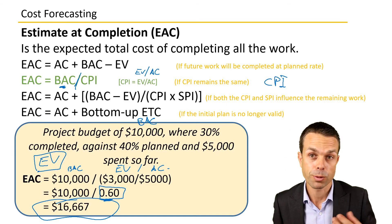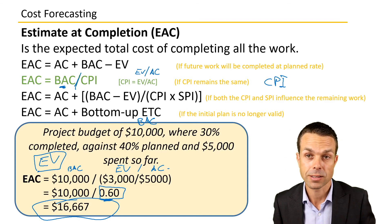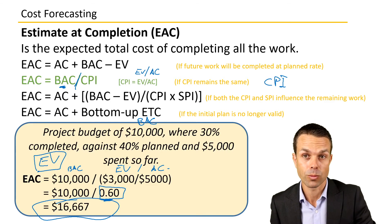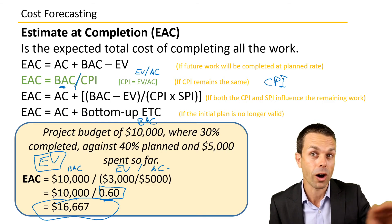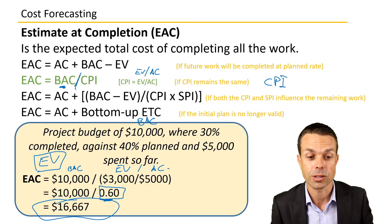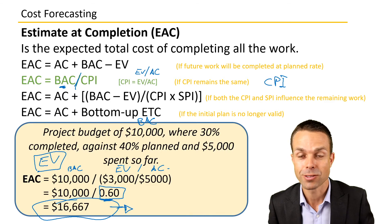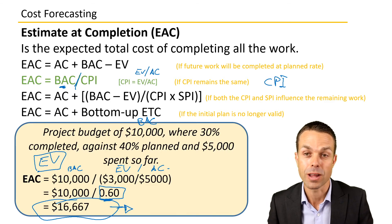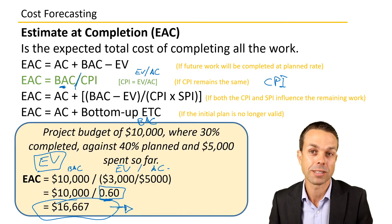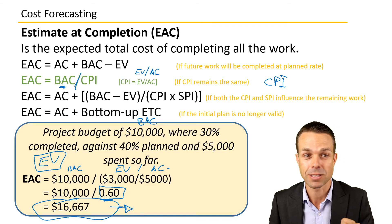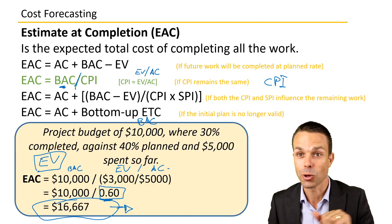So if the cost performance index is going to impact our project, we're already behind and we'll remain behind for the rest of the project. This formula takes that into account, giving us a higher estimate of $16,667 compared to the first method. This is really important to know — when the CPI influences the estimate at completion, you use this formula. There are two more methods to cover.